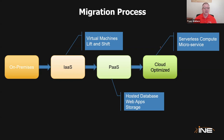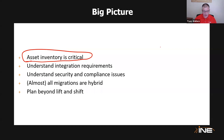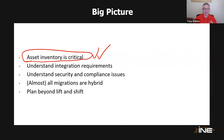That to me is the migration process. You go through the standard project planning concept, and a lot of times that's very similar to what you would do if you're extending your wide area network to another data center. Asset inventory is absolutely critical — you're pulling apart your network a little bit, and if you're doing that, it's probably a good idea to understand what the dependencies are. You don't know what the dependencies are unless you know what your assets are.